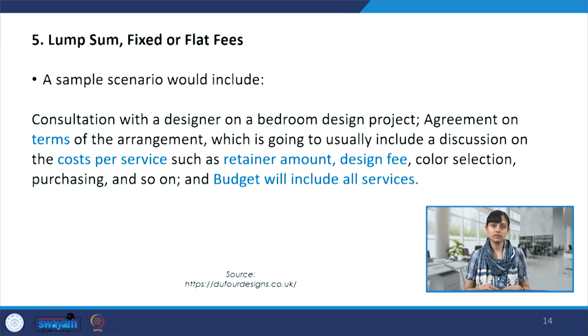Now again, if we take the same bedroom design project scenario, there would be an agreement, and there would be terms and conditions laid out. There will be costs per service that would be laid out. There could also be something like a retainer amount or a retainer fee, because you are charging flat or lump sum, before starting the project there could be some retainer amount given to the designer, and the rest after executing the project. And also there are services which are laid down for the designer to incorporate while computing the cost, like color selection or purchasing products and so on.